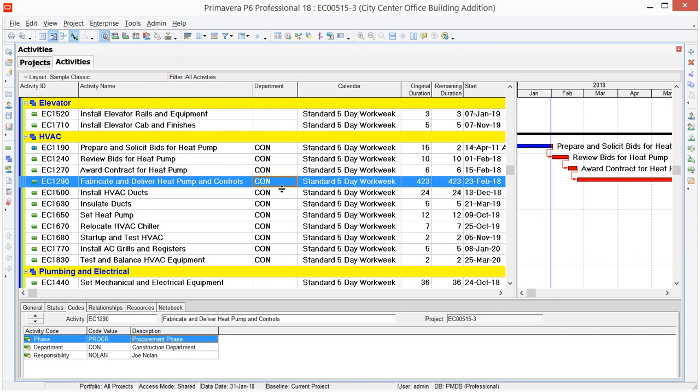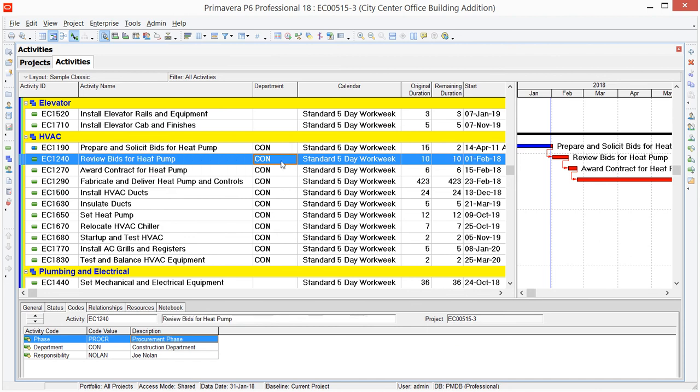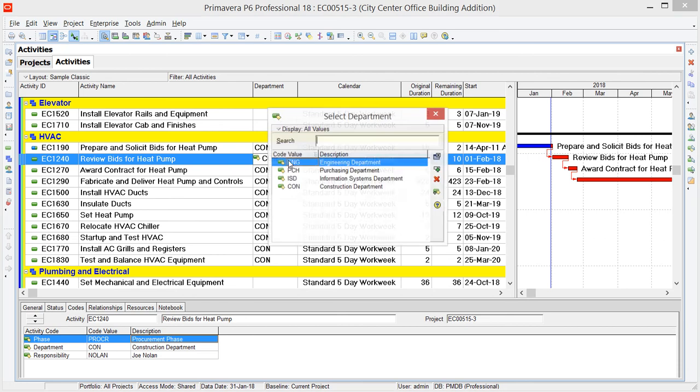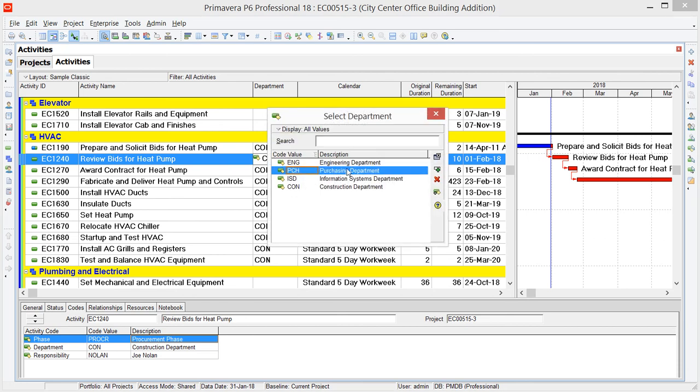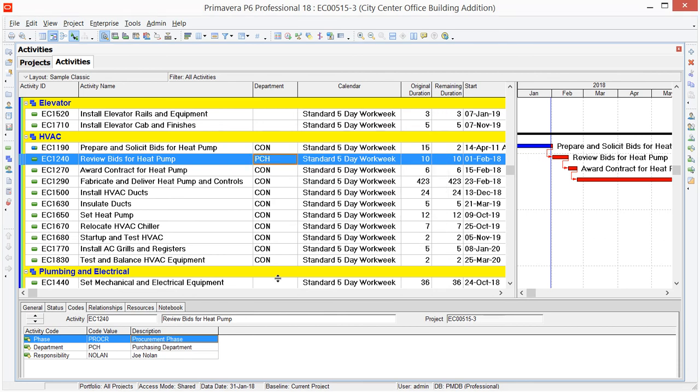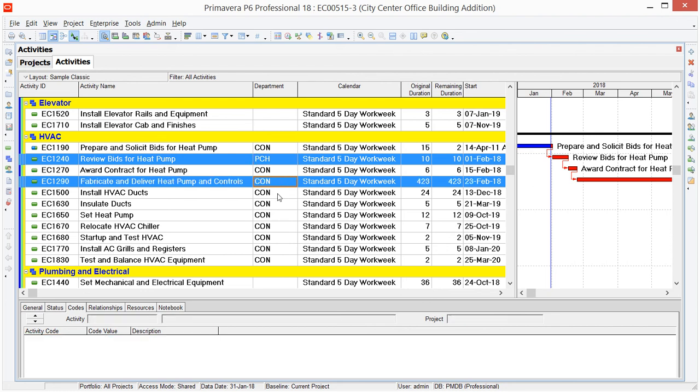Now you can use this Fill Down option for non-consecutive activities too, and to change assignments. Let's say for example, this second activity, I want that to be the Purchasing Department. So I'll change the value for at least one of the activities. Change that to Purchasing, and now I'm going to select multiple activities, only not in sequential order. I'm going to use the Control key and hold that down, and then select these activities.